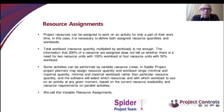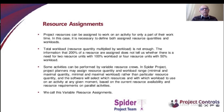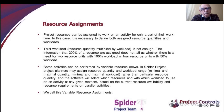Some activities can be performed by variable crews. You can assign not a fixed number of workers but a range. For example, work can start if five workers are available and assigned, but if additional workers become available they will join and accelerate execution, up to a maximum of eight workers. Spider Project optimizes resource usage by assigning all available resources that fit within those restrictions.